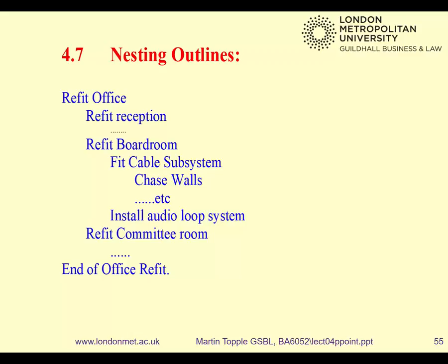Why might you do it? Well, here's an example. If you've done any computer programming, you'll be familiar with nesting. But the way it works, the main project is to refit the office, and then that's the end of refitting the office. Within the office, there's a reception room, a boardroom, a committee room, and within the boardroom, for example, we're going to fit a cable subsystem, which means chasing the walls. So gradually, you go further in, and there are layers of phases and tasks and subtasks, just as appropriate for your particular project. So that's indenting. It means doing this, but maybe more than once, depending on the level of detail you need.